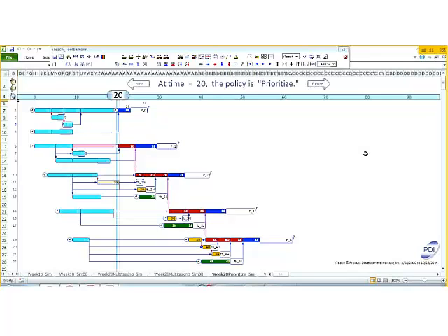So there's week 20 where we prioritized the projects. We just took the remaining work of the project, did a critical chain plan for the remaining work of each project, and then staggered it on the drum. Here we're showing the drum release from an earlier project to drum engagement on a later project. We recommend you use a capacity buffer and load the drum at 50%. And here, just to show the relationships, I'm showing no capacity buffer and an increasing project buffer. But this shows you the staggering of the projects, that multi-project system.